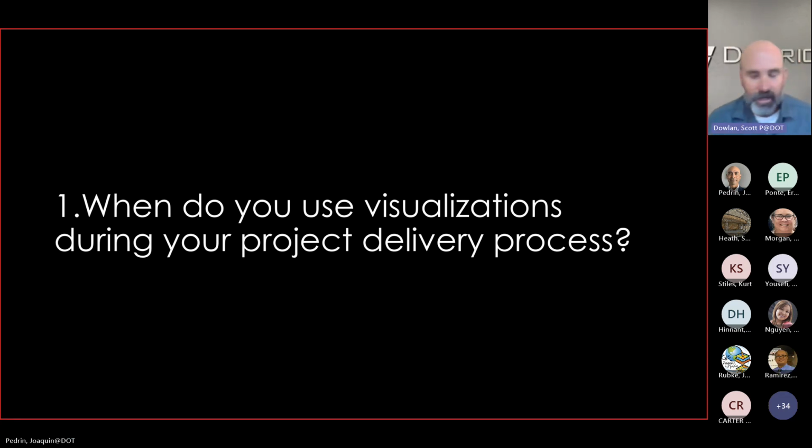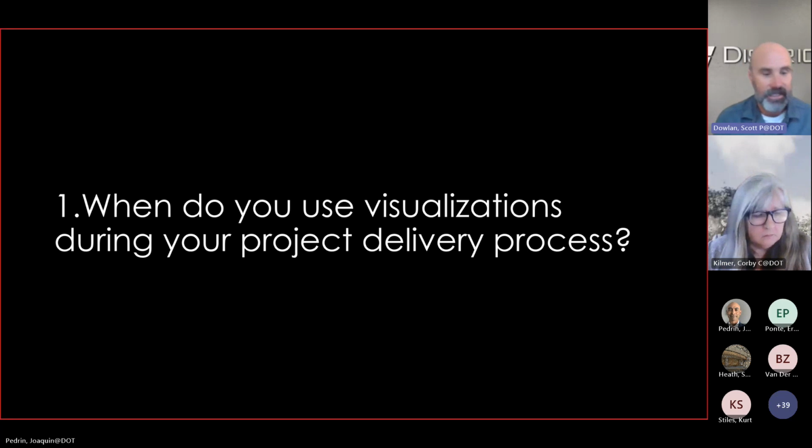Yeah, thank you. At Caltrans, we've talked about visual communications supporting basically all phases of project development. Like Kurt and Jackie talked about early on, the planning phase, doing feasibility studies and grant applications. There are a lot of opportunities with that and capturing money for new types of projects. Then in the project initiation document phase, we're looking at developing conceptual designs and alternatives, and doing project fact sheets to bring all our stakeholders on board early on.